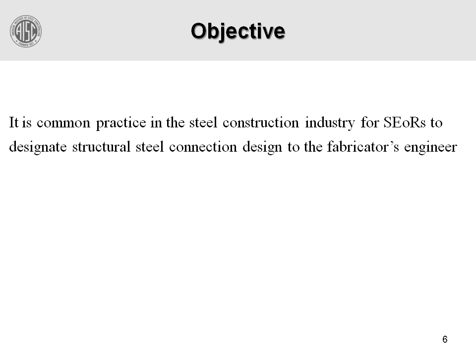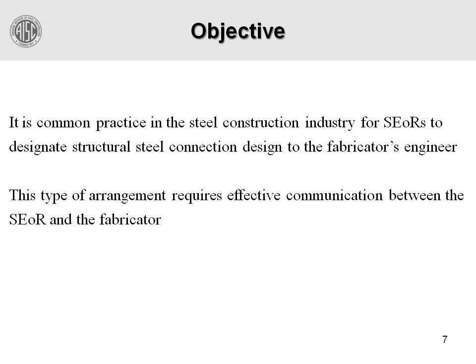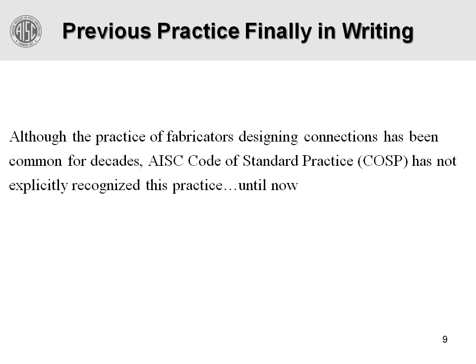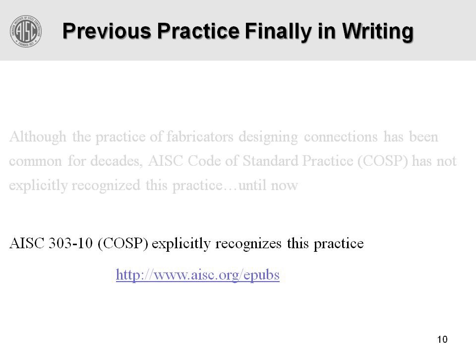The objectives here are: it's a common practice in the steel construction industry for the engineer of record to designate structural steel connection design to the fabricator's engineer. This type of arrangement requires effective communication between the two. The objective of this discussion is to illuminate the type of information that needs to be communicated between the engineer and the designer, and effective ways of doing so. Although this practice has been common for decades, the 2010 version of AISC 303, the Code of Standard Practice, explicitly recognizes it. A link is provided to download the standard practice.